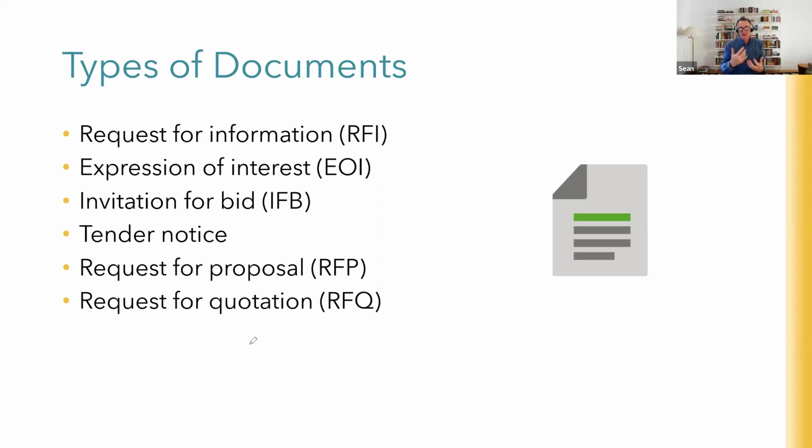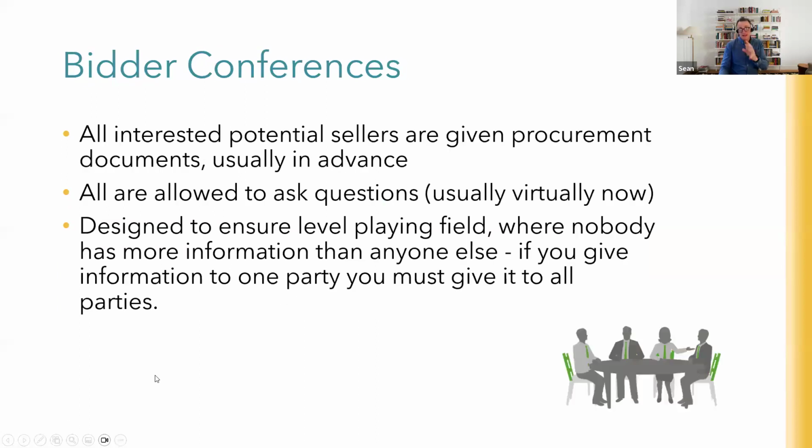You'll explain the whole process to people. You'll say, this is the process we're running, because one of the things you need to do is keep it fair and transparent, so everybody is treated fairly. During any process where one of these is open, those few weeks or few months, there is a general rule that you must be fair to everybody who wants to submit a response, whether it's an expression of interest or an RFP, a request for proposal.